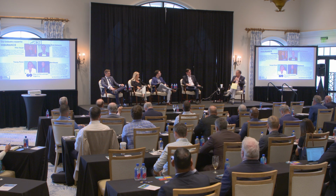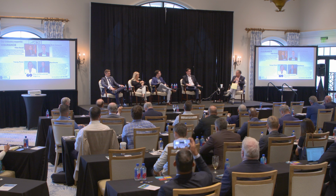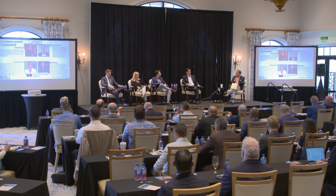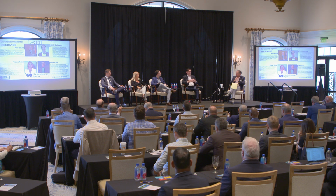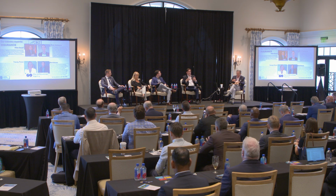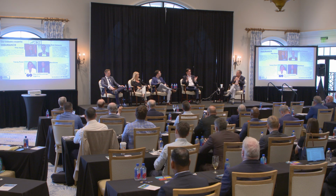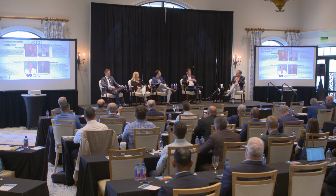And I don't want to sound like I'm repeating myself, but it's all about that contract. It's all about understanding what you're currently insured for on your current policies. But that's very, very important when determining how to structure the insurance portion of that program. We just want to make sure that anywhere we can buy the coverage to prevent a non-paid claim is what we want. And we want to have that communication. Maybe we have a sublimit on flood, or maybe we have a sublimit on wind because we can't fit it in the budget. But all that stuff has to be done before that contract is really finalized. Otherwise, we're backtracking. So that would be my key takeaway here: that communication and that contract.